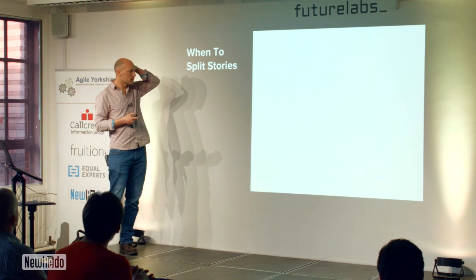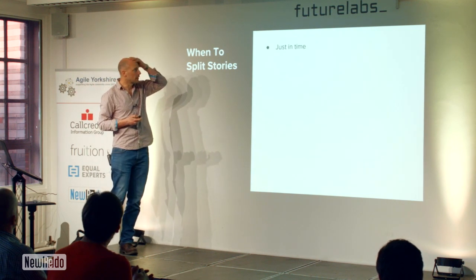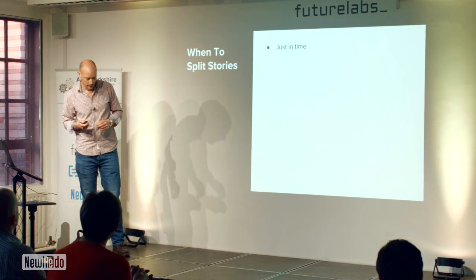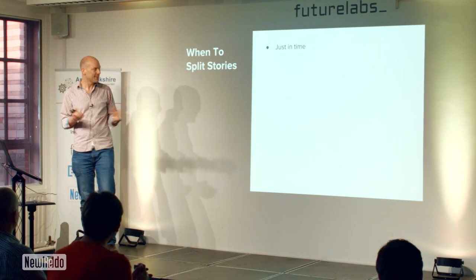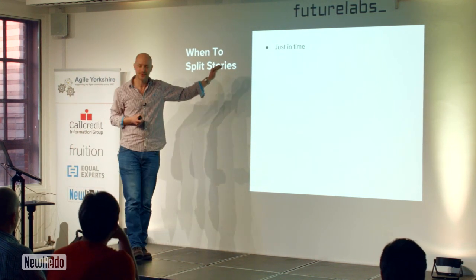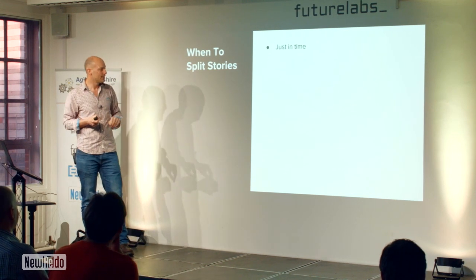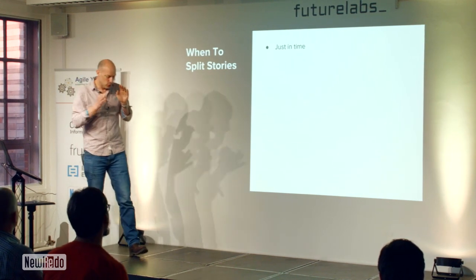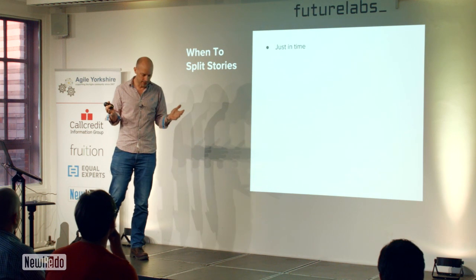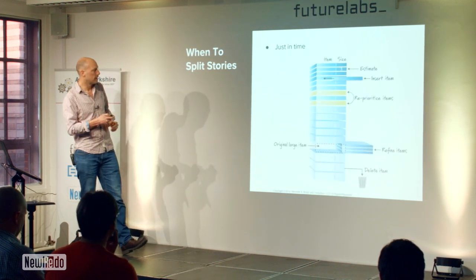When to split stories. Easy peasy, just in time, okay? So, that's less vague than it depends. So the whole point here is that you don't split all your stories at the beginning of your project, okay? And here we go, here's the diagram.